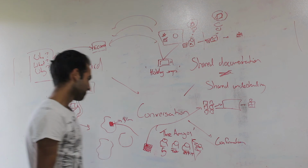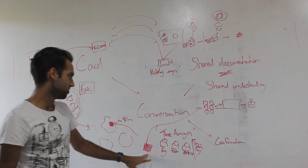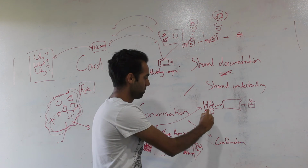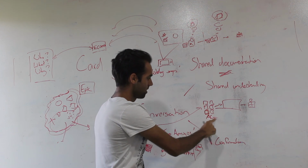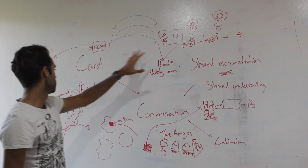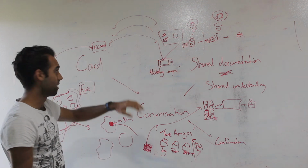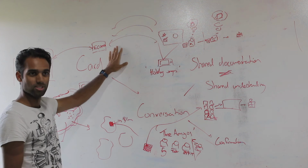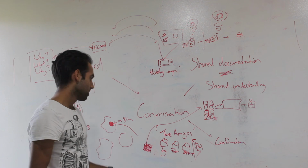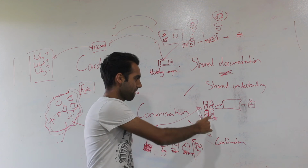That's really awesome, right? So what Jeff says is, confirmation is all about taking these gems and turning them into tasks that we can actually build and work on with really well-defined acceptance criteria. And that's the key. This is almost where we close the loop, where all the stuff that's floating around in people's heads, that we have a really good understanding of but perhaps is not written down, or where the understanding comes from people looking at photos and diagrams, gets captured. With the help of the people who are actually going to build this thing, thinking about all the edge cases, we write out the acceptance criteria and get this on a backlog.